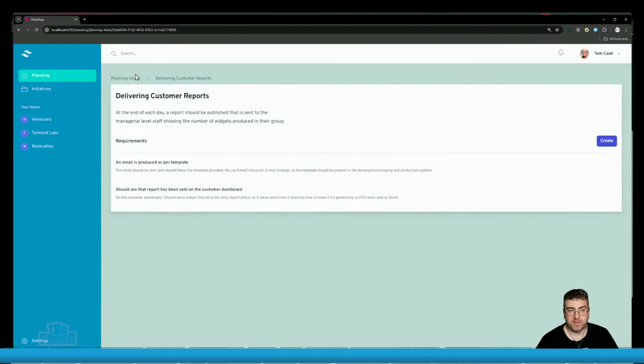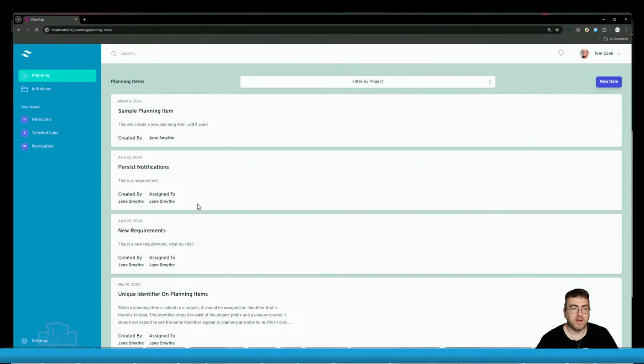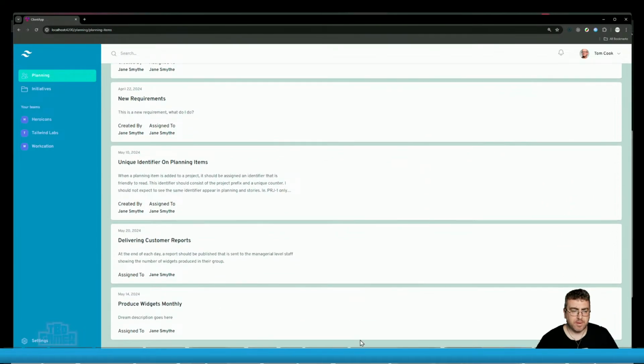Once the developers have gone through this and reviewed it and they're happy with it, stories are produced and go into the backlogs of each team with review dates, etc. Then the team gets to point and plan that work, because it is work that has been decided they've agreed they can take. These are processes that we do. All I'm trying to do is add a little bit of formality and visibility to the side that often gets lumped in with what we do.